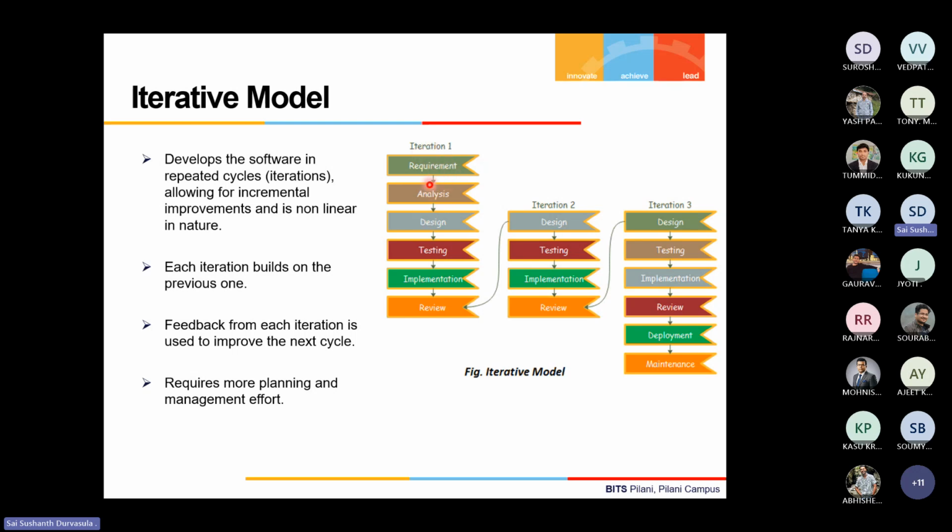Because you're reducing the effective time for this cycle, that is where you now have more chance to either accommodate changing requirements as well as take the feedback from this and improve upon it in iterations, right? And at the end of this, you do have an intermediate deliverable as well, because those 2 to 3 features are something that the customer can then use as well, right?